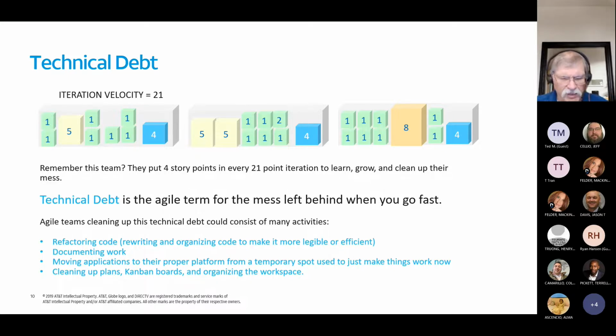Defects can be removed or identified many different ways. One method that I've used before is a structured way of reading through the resulting code or work product by an independent party, just taking a look at it and interpreting it, paraphrasing it and feeding it back with the author there, to make sure that we have agreement on what was produced. Doing the same thing with the tests that have been created.